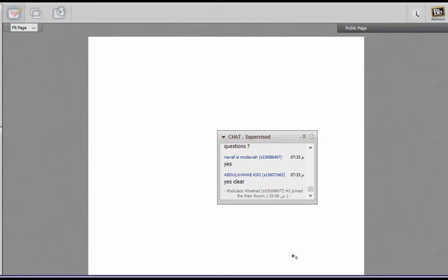Extract all the verbs, and just like the product-based WBS, make them in a hierarchy. At the top, keep the project. After that, keep the phases, and in the phases, put all various activities which have been asked from you. So, whichever WBS you have to make, you can easily make it. It is going to be a very easy question. You won't need to make any mathematical calculations for this, but it is an applied question and you should be practicing it very carefully.